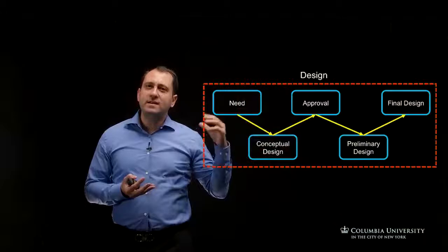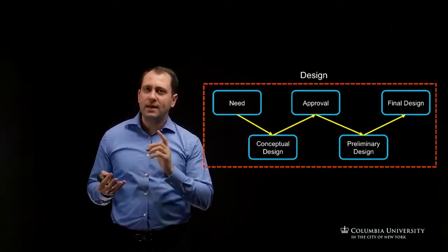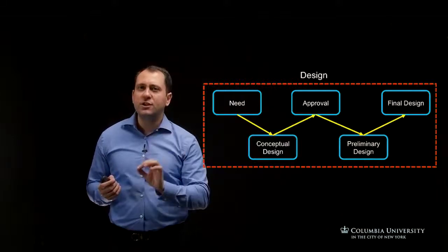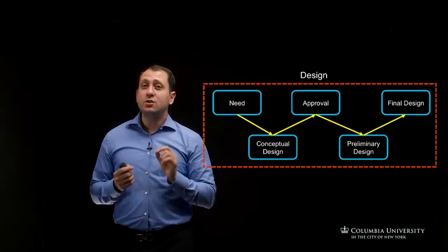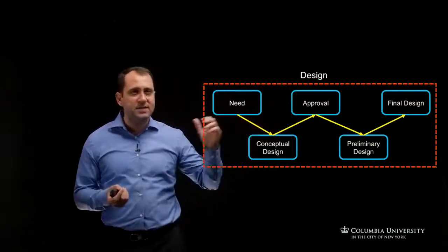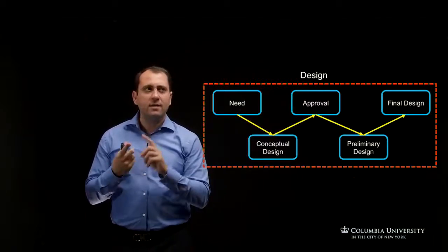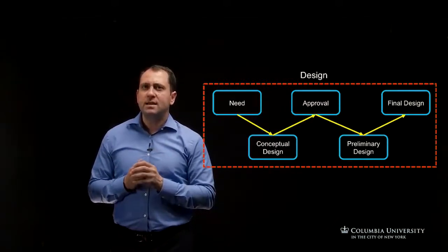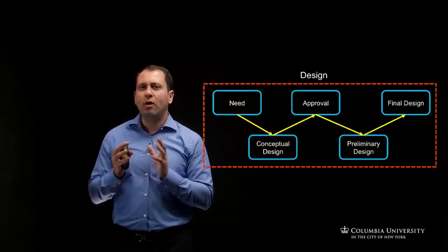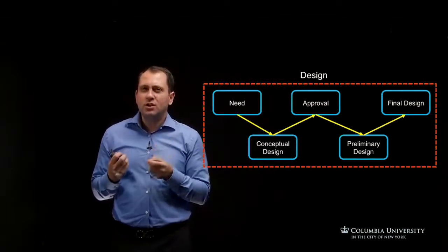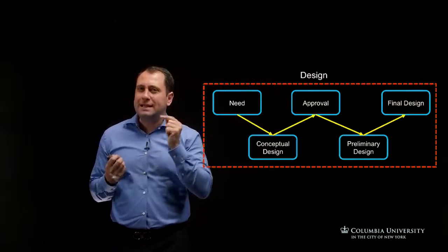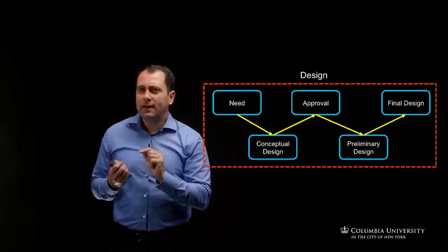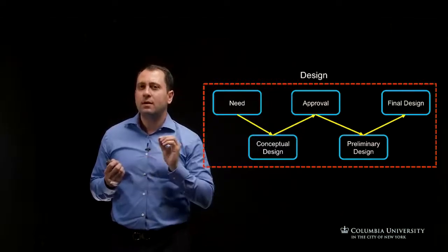The end product of the design phase in general for the project development is a set of plans and specifications that define the project to be constructed. This is usually achieved in two steps, which are the last two steps here: preliminary design and the final or detailed design. The preliminary design usually offers the owner a pause in which to review the construction before detailed and final design commence. And usually this happens when the design is at 40% completion of the total design.